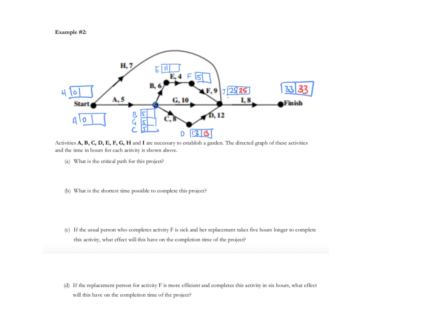If I do 25 minus, oh, wait a minute, I forgot. Remember H came out here too. But I don't have to worry. I'll go backwards via H. So 25 minus 7 would be 18. Now if I go 25 minus 9, what would that be? 16. 16 minus 4 would be 12, and then 12 minus 6. So going back via B will be 6.